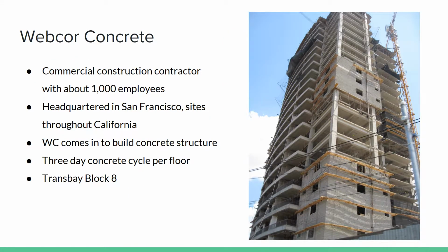So Webcor Concrete is a commercial construction contractor with about 1,000 employees. Their headquarters are up in San Francisco, but they have sites all throughout California. Specifically, Webcor Concrete comes in to just build the concrete structure of the buildings. They have a standardized 3-day concrete cycle per floor, and specifically when we went up to visit their job site, we looked at their project at Trans Bay Block 8, which is a 55-story residential living building.